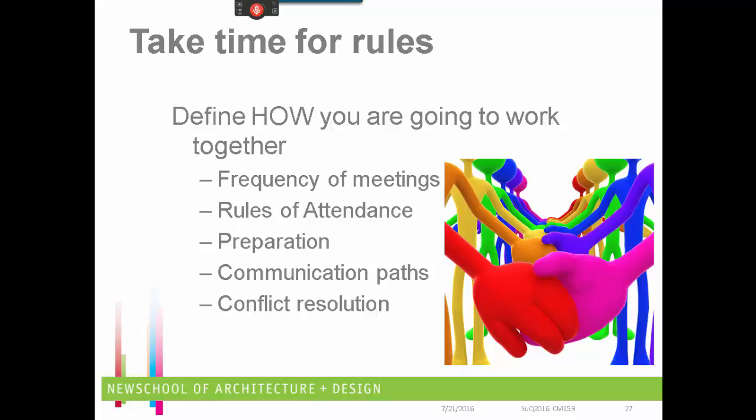The last thing is you need to be able to agree to, in writing, how are we going to resolve conflicts? Are we always going to have to compromise? Are we always going to use consensus? Are we going to potentially have to go to an outside mediator to resolve those conflicts? Whatever the method you decide to use, everyone needs to agree to it. And oh, by the way, once you've got your team constitution put together, you want everybody's wet signature on that. You want that signature to show that they are committed to that problem resolution.